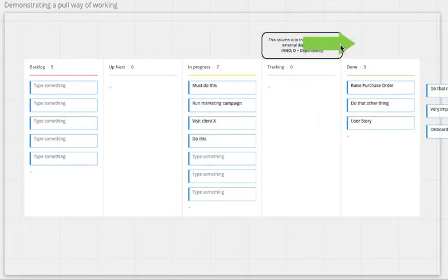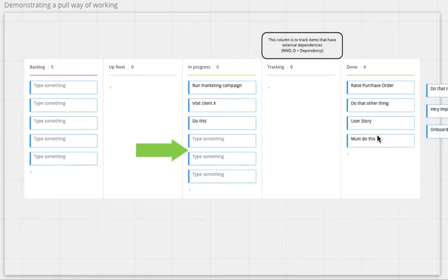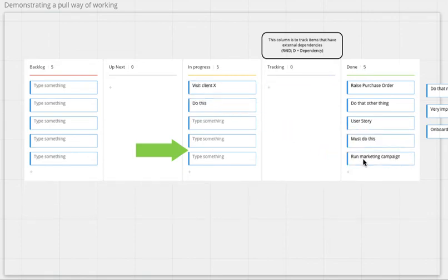And then at that point in time, whether it's the next day, 2, 3, 4 days, stand on the right, celebrate your success, and do candidates for release management if that's the way you work. Look back, look down, and swarm around this item. Form a 24-hour plan. Swarm around that item. Form a 24-hour plan. Keep going until you're full. Let's pretend that the team's full at this stage, and that it manages to get 2 items done.